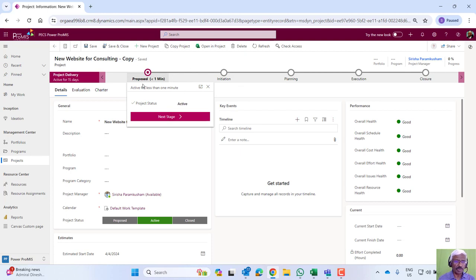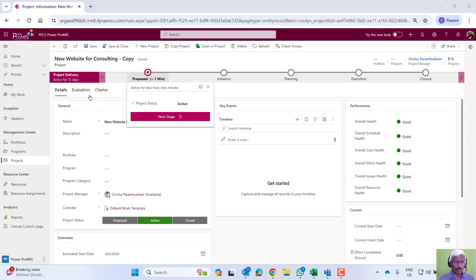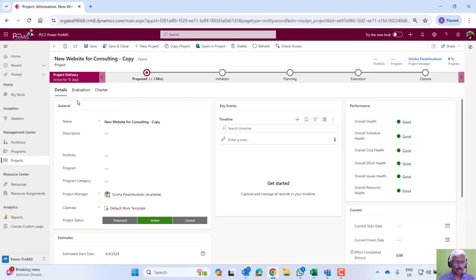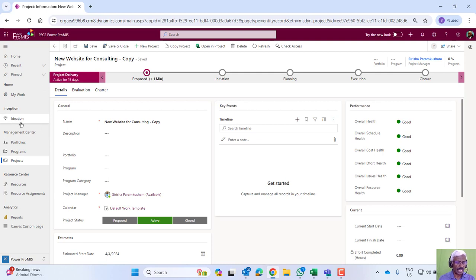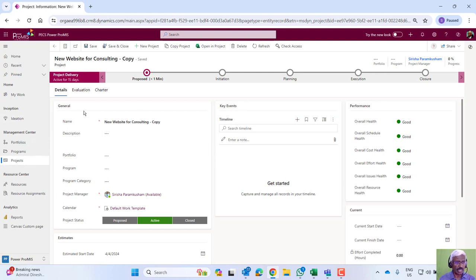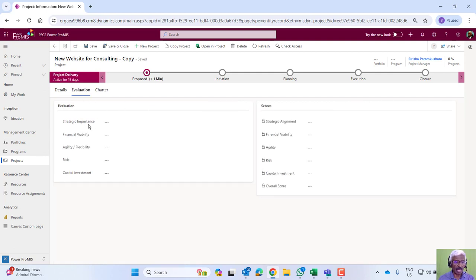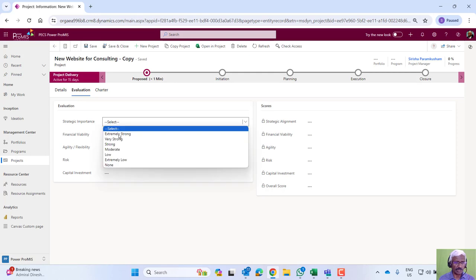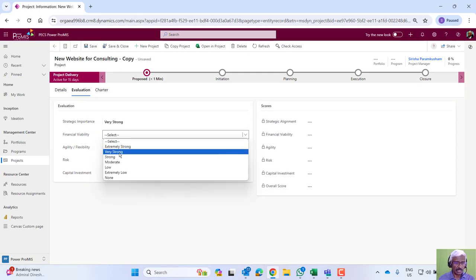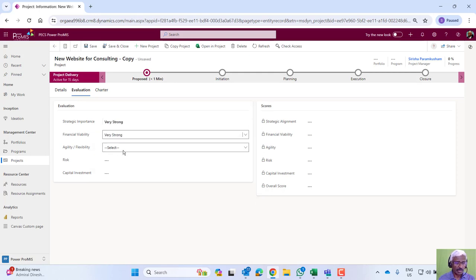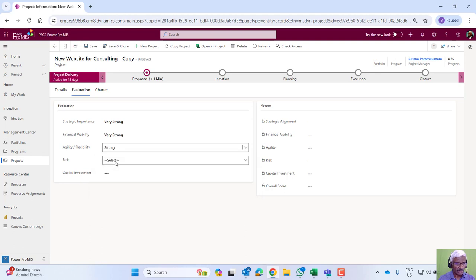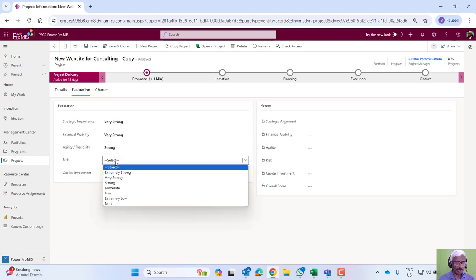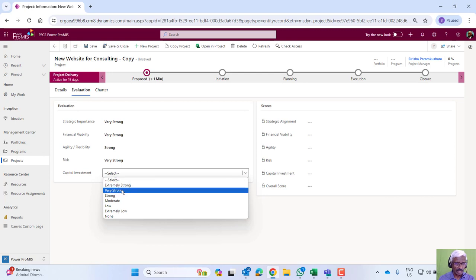During the pre-project stage, we register a project in response to, let's say, an RFQ or internally initiated requirement, or transitioning from an ideation stage to a project. We record the high level statistics and then we can do a formal evaluation of this project in terms of strategic alignment, financial viability, ease of implementation, and risk of success or failure.